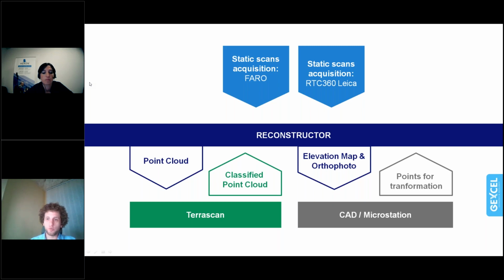If you do it a few days after the construction, it's easy. If you do it a bit before you hand over the area to the general contractor, it's still better than getting back in 1 year for additional costs and additional time loss.